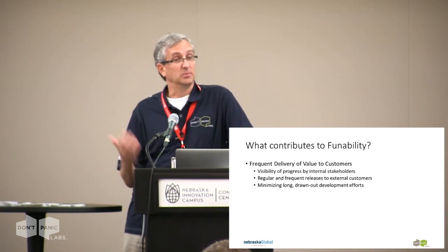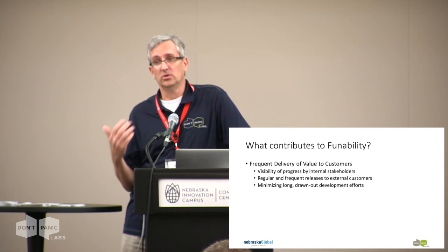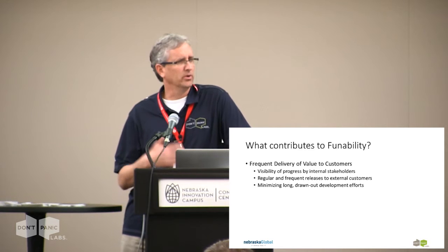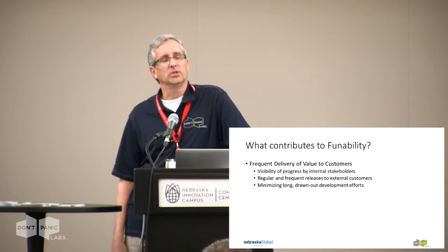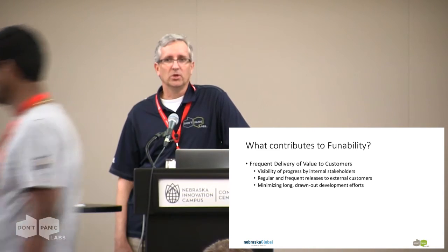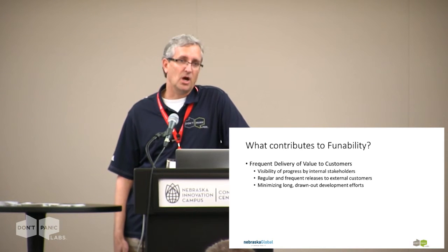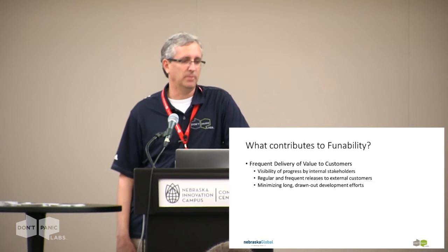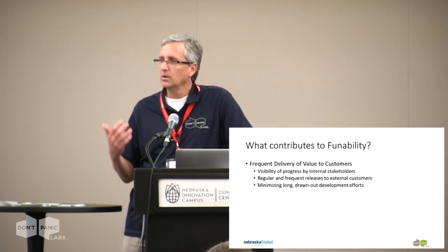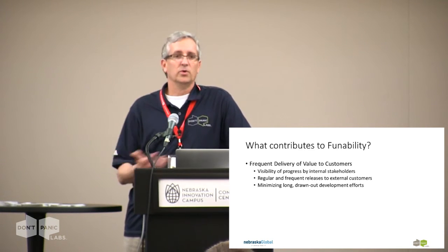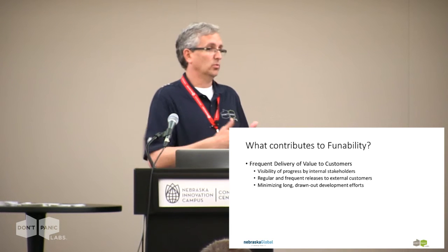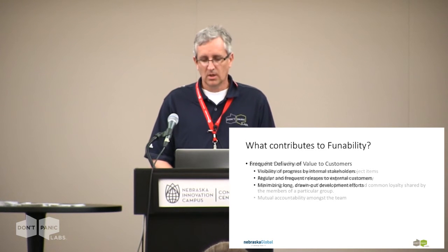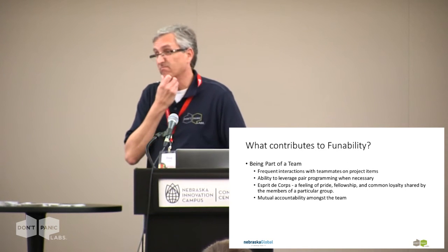I think this speaks to a lot of people who are in kind of a continuous deployment, agile environment. We came from an environment where we were doing releases maybe 3 times a year. And when you build up that much code over that amount of time and try to pull it all together into a single release, it can create a lot of pain. So we found that if we can increase the frequency of how often we're providing value to customers, that definitely helps quite a bit. The other part is being part of a team.